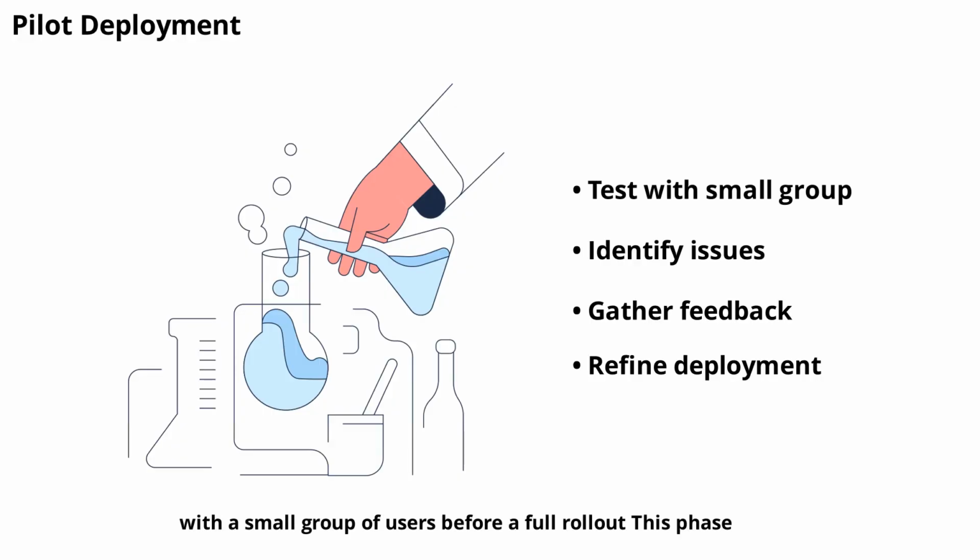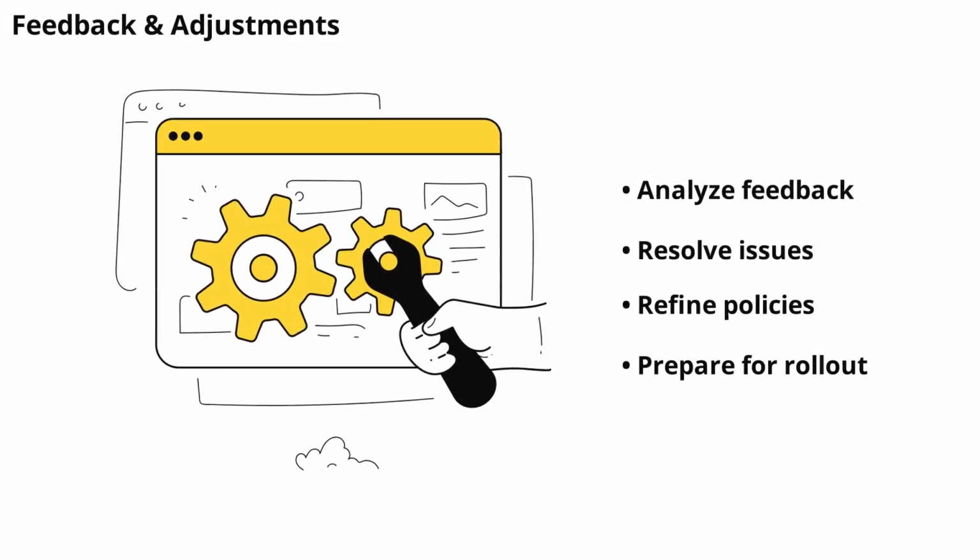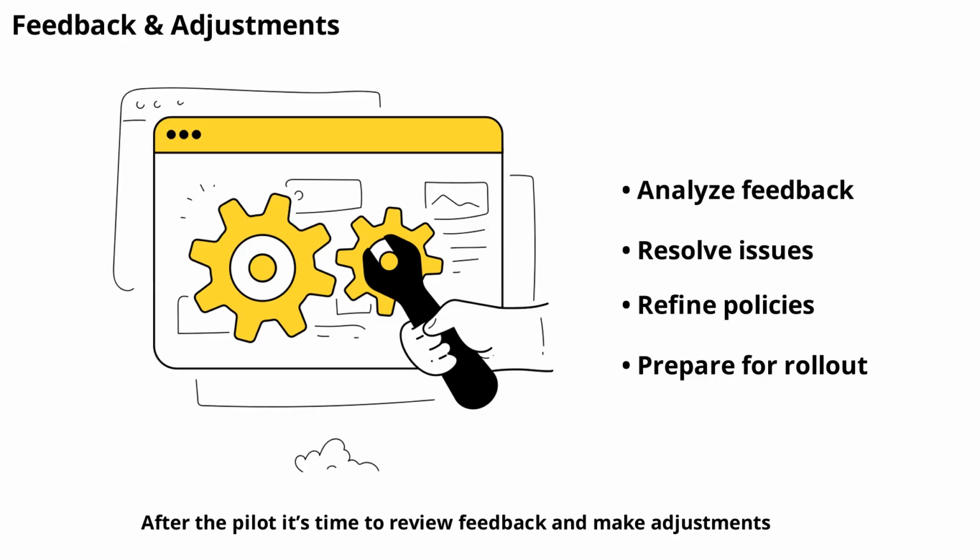This phase, lasting 2 to 4 weeks, helps you identify any issues, gather feedback, and make necessary adjustments. Pilots reduce the risk of widespread disruptions and ensure your solution works as intended in a real-world setting. After the pilot, it's time to review feedback and make adjustments.